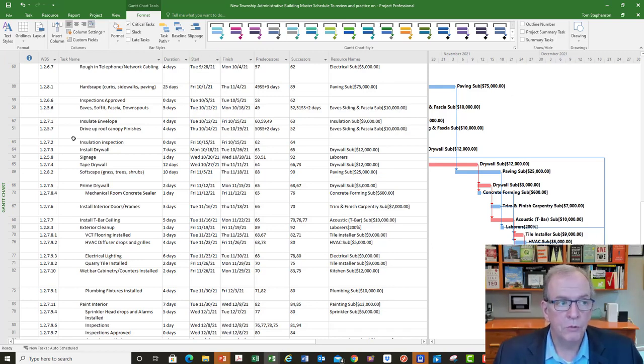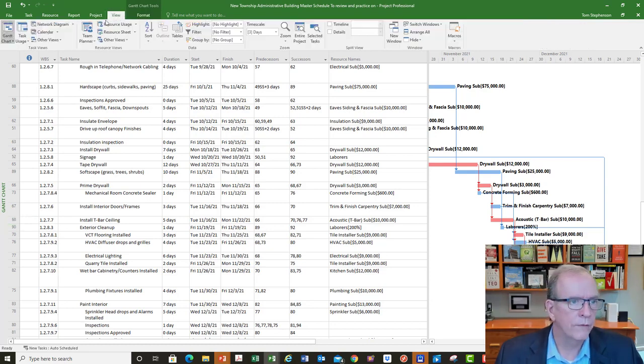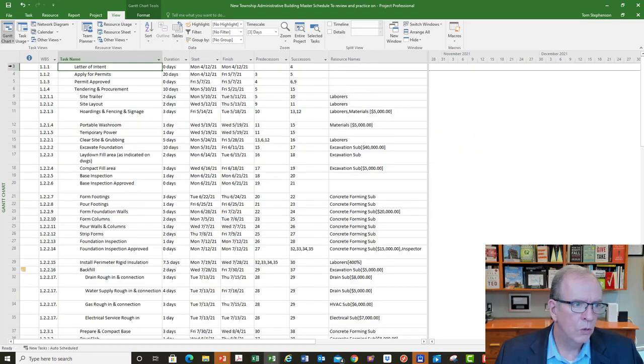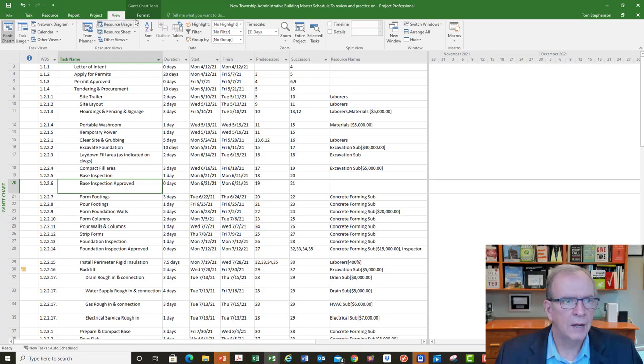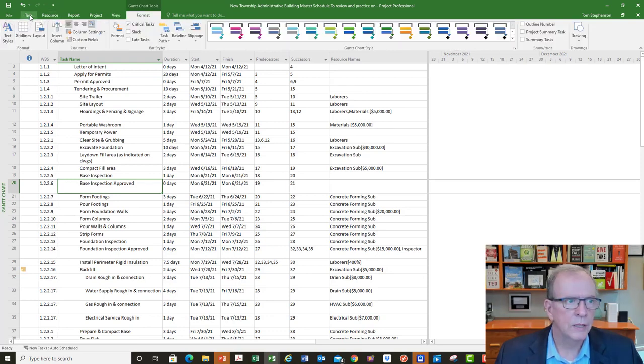You probably had, before, it sorted by unit number, so by ID number. Every activity has its own unique ID number, and that's the default unless you do some other different sorting. If I want to sort this by ID number, because you can see that goes 66, 89, 73, 67, 68, 90. It's not in order. If I wanted it to go back in order, I go to the View tab, pull this down, and go sort by ID, and that will give you 1, 2, 3, 4, 5, 6, 7, 8, 9, 10 in that kind of order. I'll just bring this scroll to task.